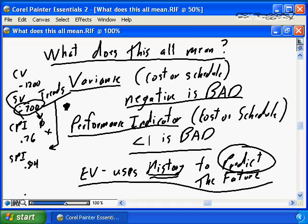So then you've been able to take actions to correct the schedule variance. You have probably not taken any actions to correct the cost variance. The cost variance is being caused by overpriced resources, more expensive resources on your project. But maybe, again, you can start to take separate corrective actions to deal with the cost variance. Negotiate with human resources, negotiate with senior management: why should my project be burdened with this extra charge when in fact it's not my fault, it's not my project's fault, etc., etc.